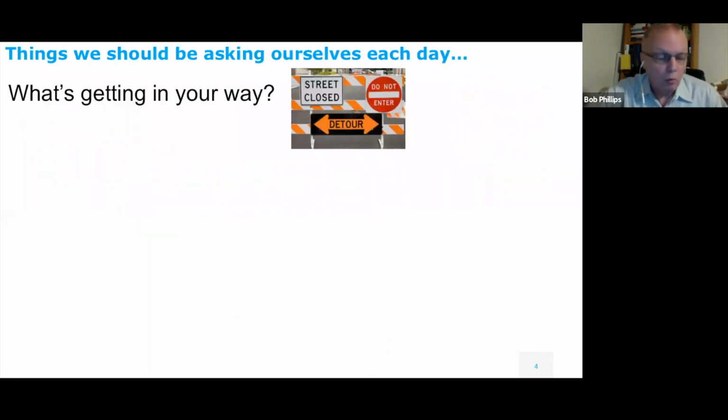So when you have your daily Scrum, the typical thing people ask when they give their update is, what did I do yesterday? What am I going to do today? And do I have any blockers? That's great. Your daily Scrum meeting should be within a 15-minute time box. There's no reason it should be any longer.